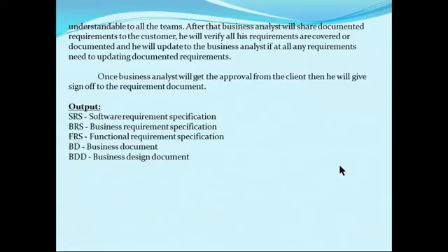After that, the business analyst will share the requirements document with the customer. That's what I told you. He has to verify that all his requirements are covered and documented, and he'll update the business analyst if any requirements need to be updated. We'll send one copy to the client. The client will verify that. If any modification is required, he'll request them to modify. Once the business analyst gets approval from the client, he'll give sign off to the requirements document.